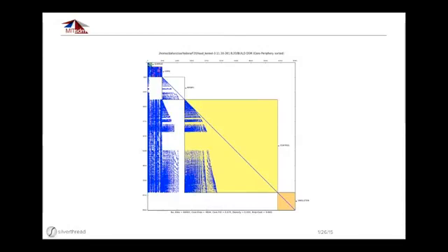You may want to allocate more testing resources or test coverage. You might want to have more process around the release cycle. You might want to freeze that code earlier. So if you ran this type of network analysis, you could figure out where you need to be more careful, where you need to allocate resources, and where your areas of highest risk happen to be.